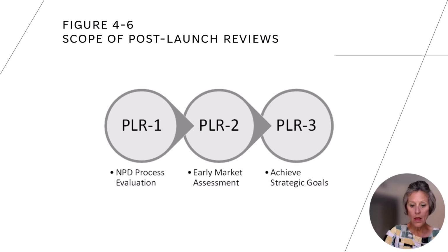Gatekeepers should be aware that more customer testing in the concept evaluation phase will result in a budget requirement that includes external spending. Up to this point in the Waterfall NPD process, generally only internal resources are committed, but Stage 3 requires prototype tests to validate further development. Building a prototype typically uses raw materials and resources extending beyond the core NPD team. Moreover, focus group testing of prototypes usually involves hiring an outside facilitator to run the sessions, analyze data, and provide incentives to potential customers.